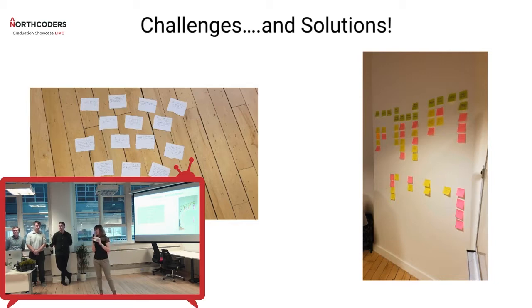The other section of the challenges we faced could be described as project management things. There are things that we think we did pretty well. We followed some agile best practices. We had stand-ups every morning and every afternoon where we talked about what we'd done previously, whether we had any blockers, and what we were going to do in the next few hours. We also created user stories to begin with, and a user journey map, which you can see here, which really helped us map out the different features of our app before we started. So they were really good things that we did to begin with.